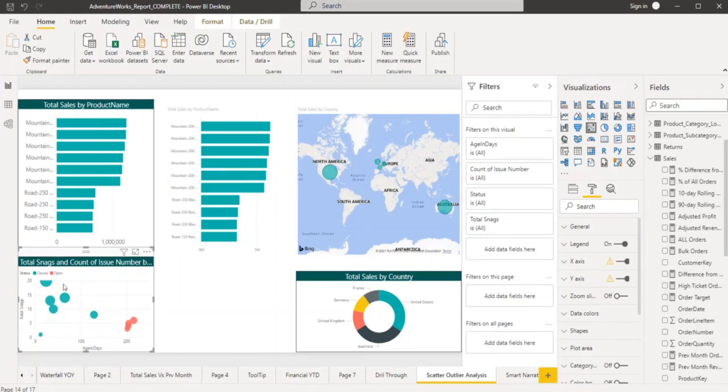So in this example, let's say we look at how many of the total snags are open and how many are closed within the stipulated days, let's say within 7 or 10 days, whatever is agreed. The head of the department, the person responsible for snags, for example quality, and even the project manager can raise a flag asking why these snags are getting delayed for closure.